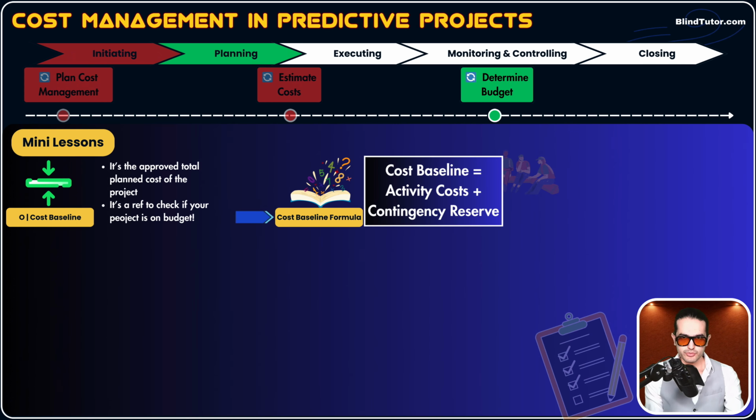We need labor to do things. We need equipment. For example, we rent equipment and that equipment costs us. We need materials, okay? Cost us. Cost of quality, remember those preventive costs, appraisal costs, internal failure costs, external failure costs, okay? And then we also consider risks associated with each activity, and these are contingency reserves.